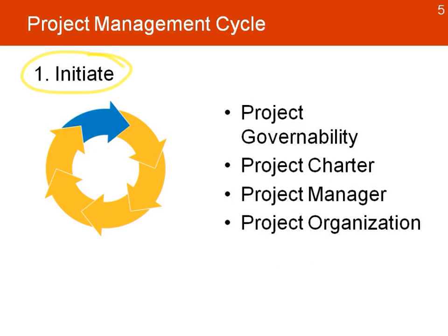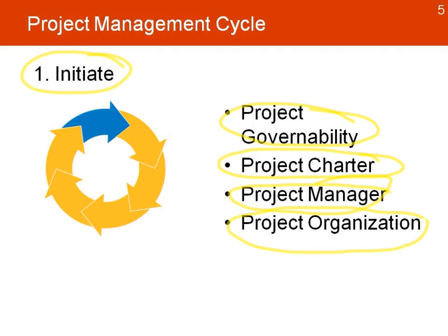The initiation phase is that once we got the project approved, we got the funds from the donor, we got the resources needed, and then we start with the concept of defining the project governability. Means that the decisions are going to be made, the structure and the approvals, and means the appointment of a steering committee, the development of a project charter that authorizes the beginning of the project and appoints a project manager and a project team and helps us manage the structure behind the project organization.